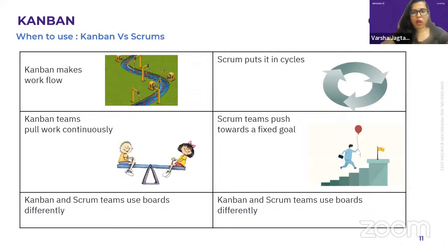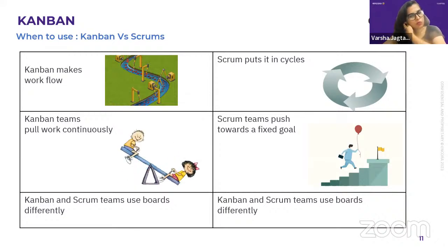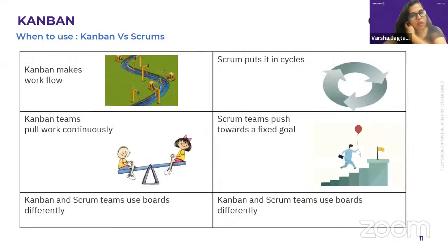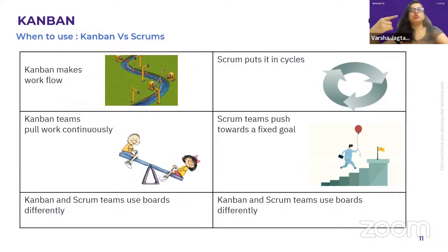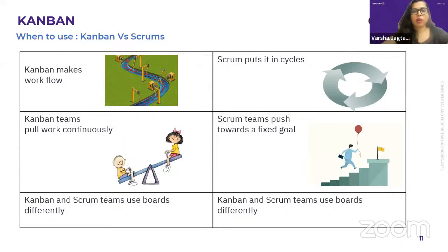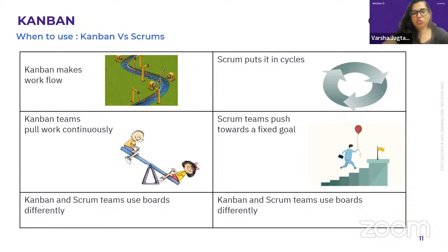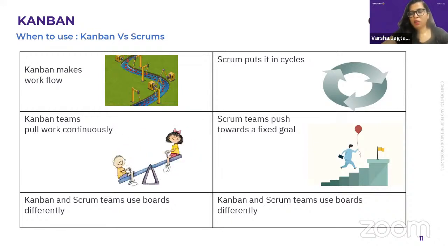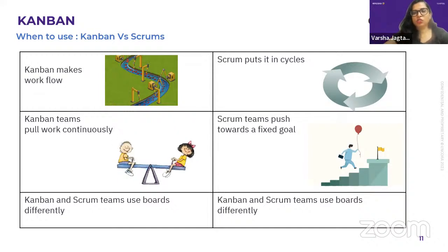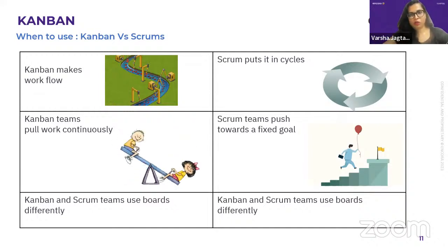Okay, so how are they using that board? I would say Kanban is just about giving transparent status of where you are blocked. Scrum is much more different. It has that time-box approach, or timelines, in my mind. Like in a 2-week sprint, I'm saying this should be delivered, and out of this goal, how much is delivered and how much is yet to be delivered.